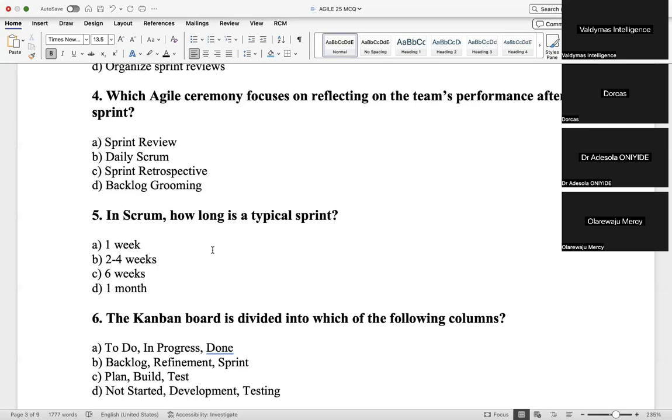Once you see a project running on 3 or 4 week sprints, 2 things would happen. Either those deployments are huge development work, or the Scrum Master or the program manager wants to have some breathing time. That's why they make it 3 or 4 weeks. But usually a 2-week or 1-week sprint will keep everybody on their toes, seriously.